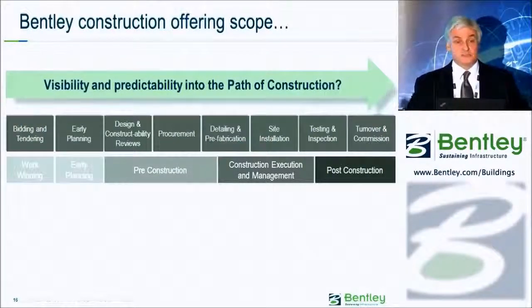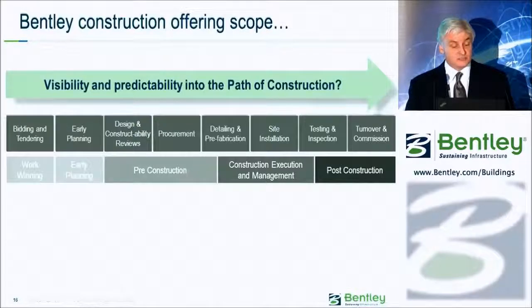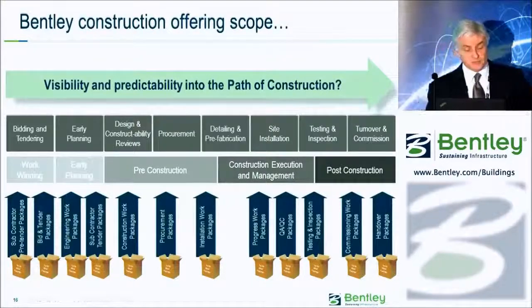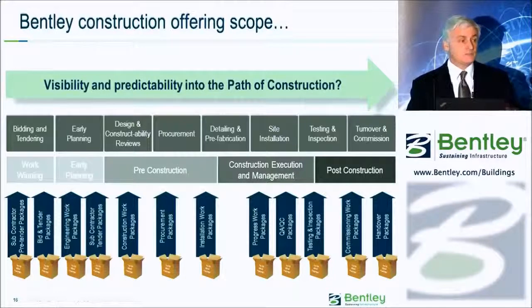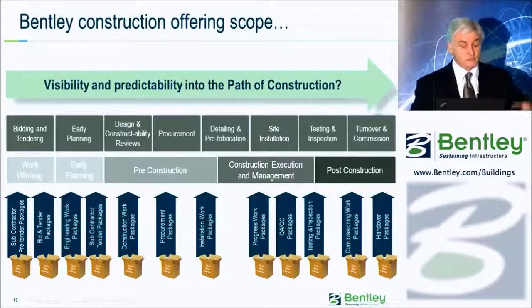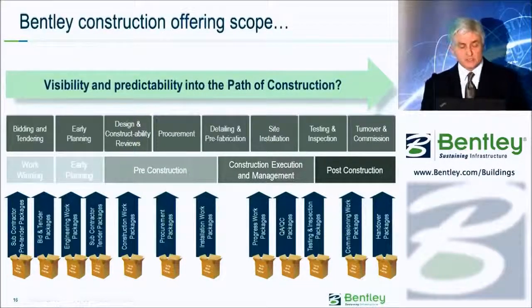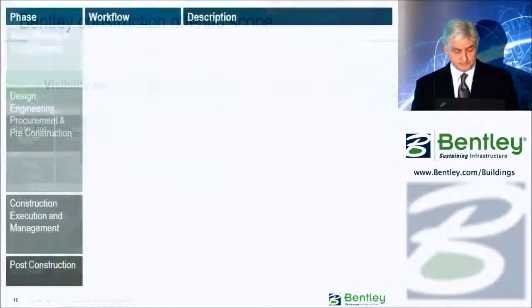In terms of the scope, we wanted to cover, I said we must cover everything. It must cover cradle to grave of the construction process as much as possible, from the tendering and bidding process right the way through to commissioning and handing over and turning over at the back end, all of those bits. And the other thing is, in doing that process, what we identified was that there was an awful lot of information passing backwards and forwards all the time in forms of work packages. You can call them whatever you like, but it was bundles of information going backwards and forwards, and it was these work packages. I'll come on to these again later on, but it's this work package that we identified as being a key currency of exchange, if you like.